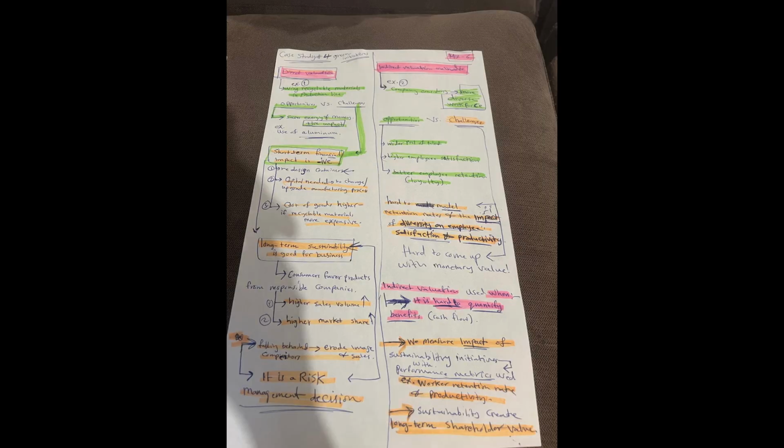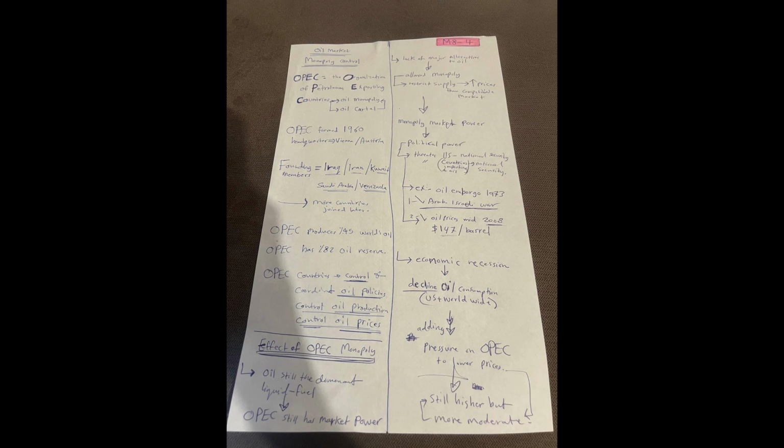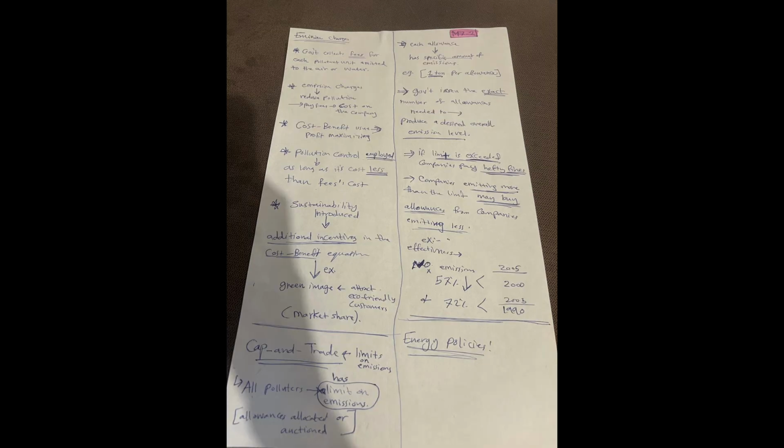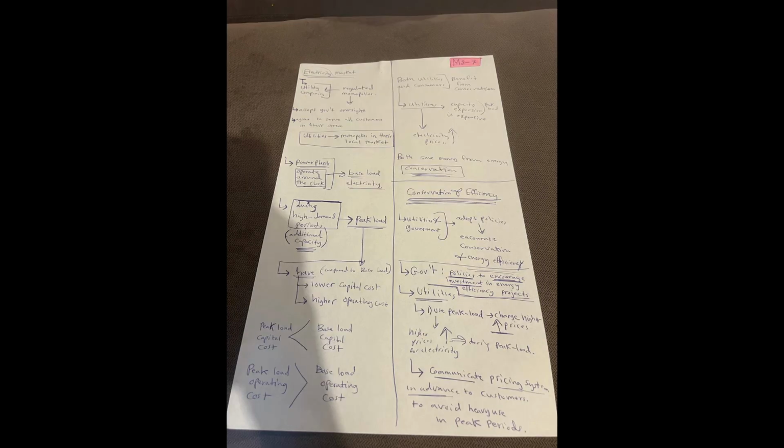Got it. And to really dig into that, we need life cycle cost analysis, LCA. Right. Traditional LCA is all about the money trail over a project's life. Like the initial cost, running costs, getting rid of it at the end. Yep. Capital expenditures, operating maintenance, decommissioning, and crucially, it adjusts for the time value of money. A dollar today isn't worth the same as a dollar in 10 years. Standard finance principle. So how does sustainable LCA differ?